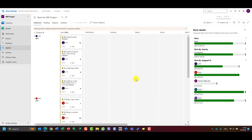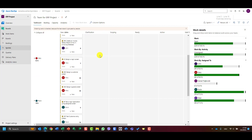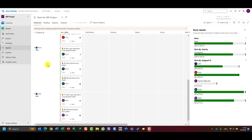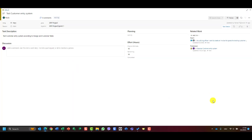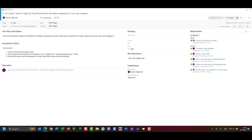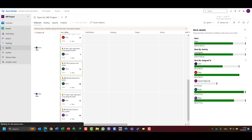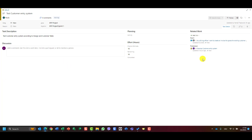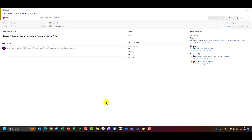Now I want to show you one very interesting thing: how tasks are linked together according to this sprint and this user story. Let's take a look at 'Test Customer Entry System'. If I click on this task, you will see that it has a predecessor: 'Develop Customer Entry System'. Why? Because obviously if you want to test customer entry, you cannot test it before the predecessor is done — 'Develop Customer Entry'. You will see the successor is 'Test Customer Entry Screen', and the predecessors are 'Create Customer Entry Table'.